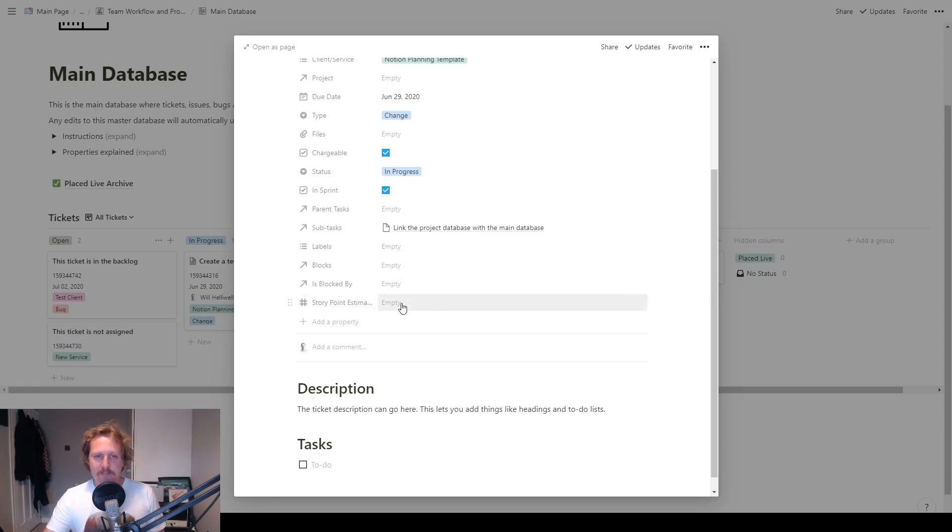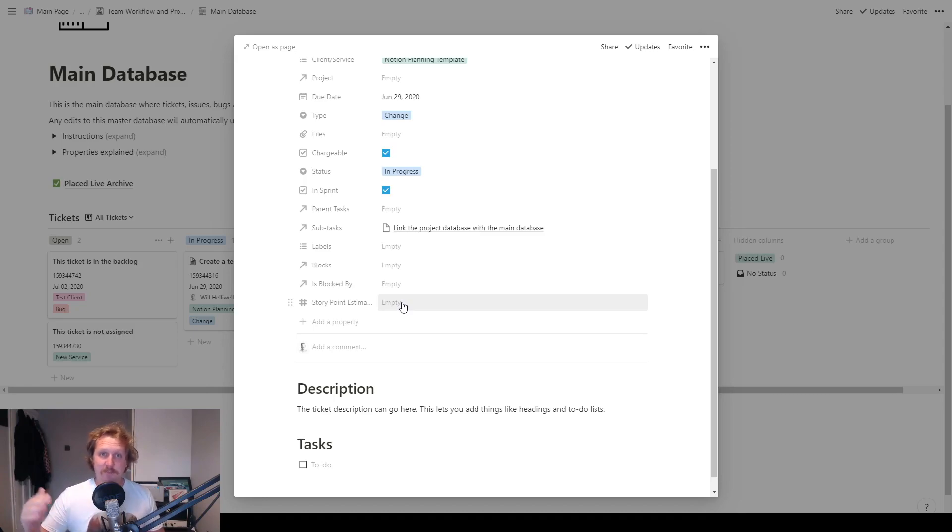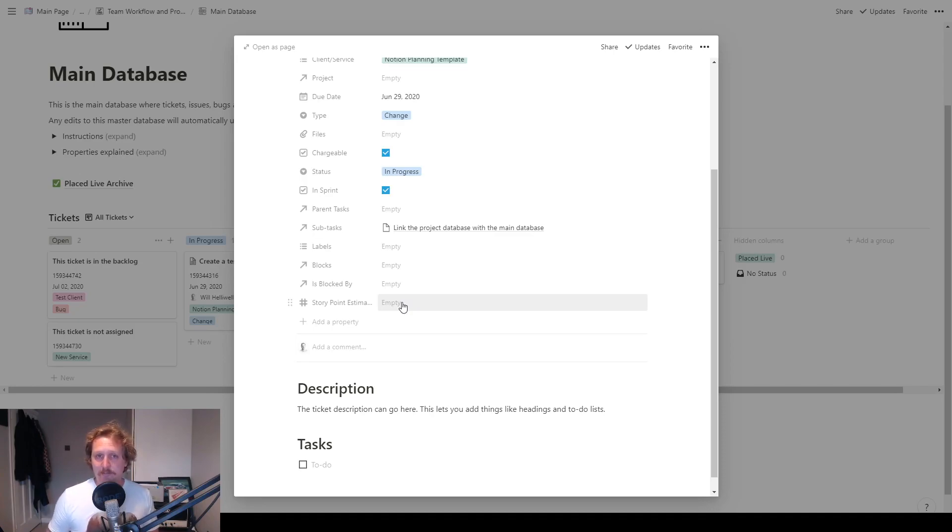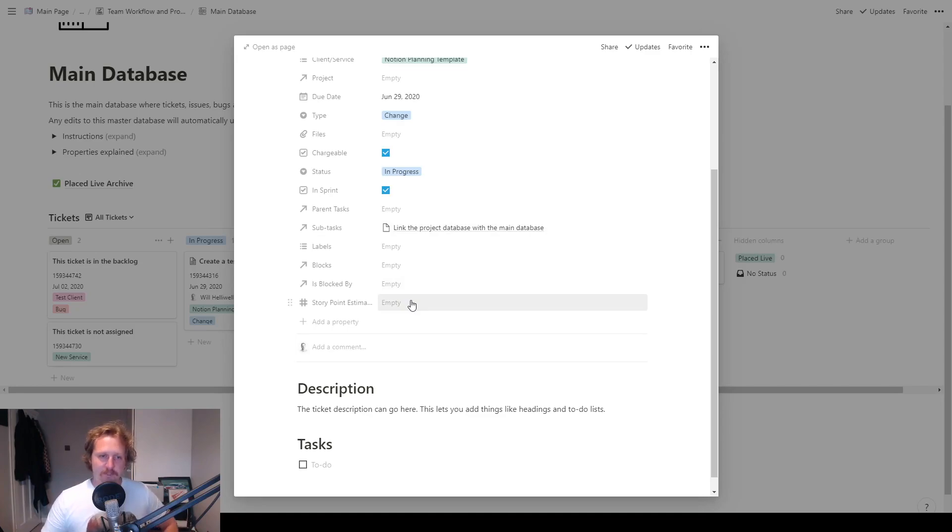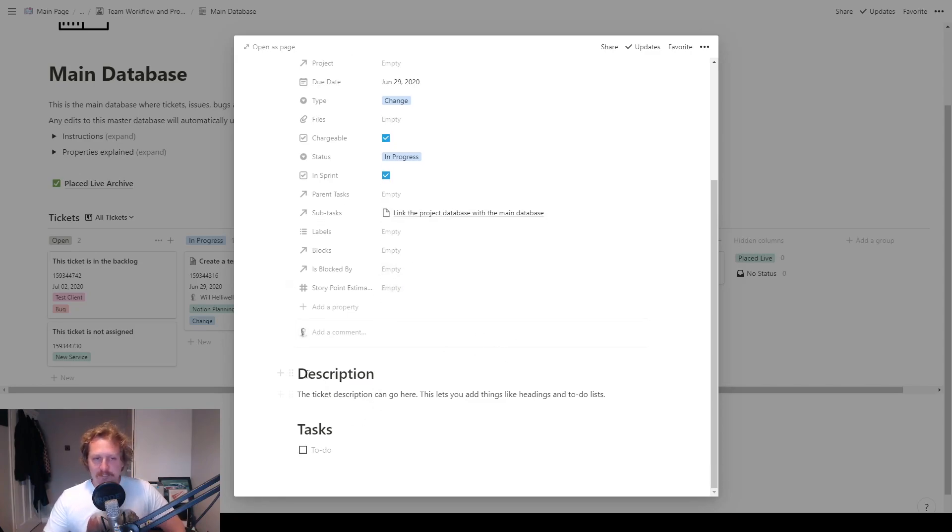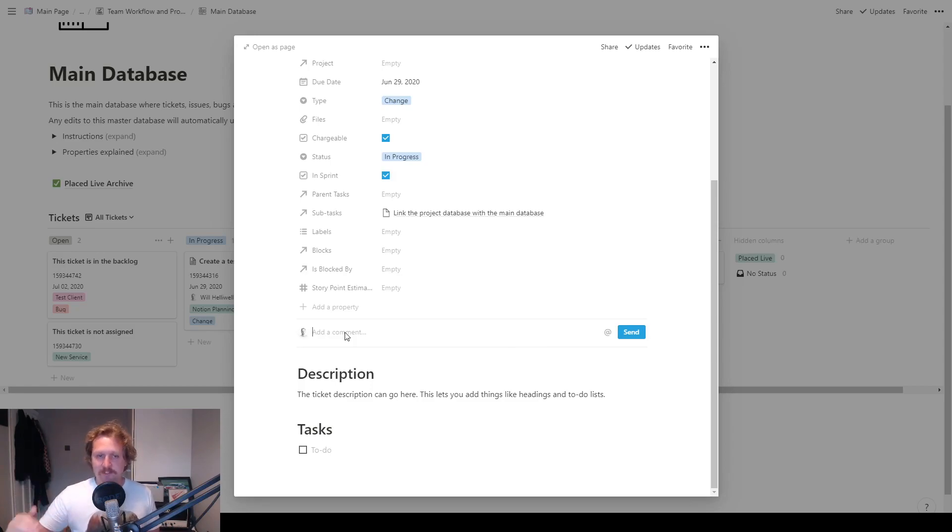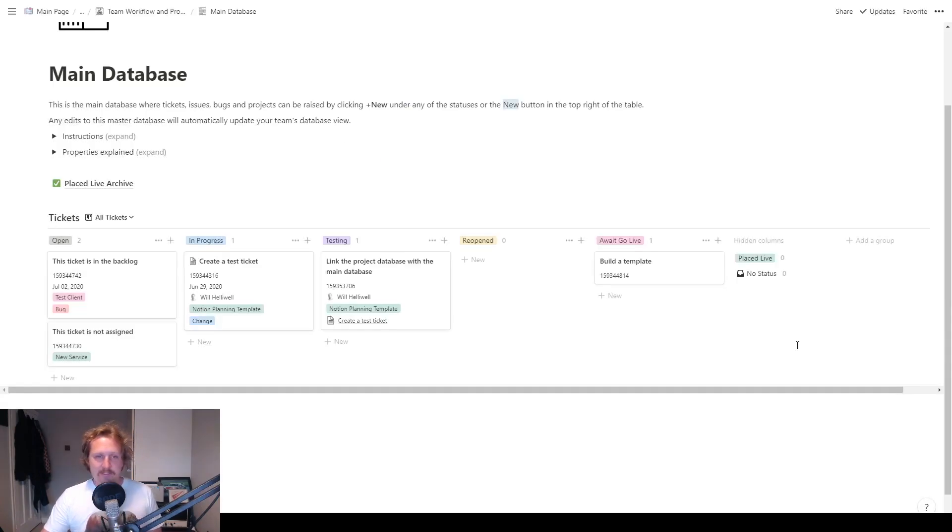And then story point estimate. Some teams use this, we don't at the moment, but it might be a good idea too. But basically you can have points based on whatever number system you want, and give each ticket a number of points or how many hours you think it might take to complete the ticket. And then you can kind of gauge how much work you can do in each sprint. And then at the bottom here, I've just added a description and any other little tasks that you might want to do. And then if you're working in a team, you want to add all your comments into this section here, and there you can tag people and people can have a conversation inside that little section.